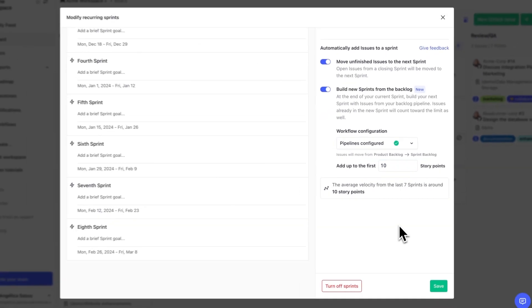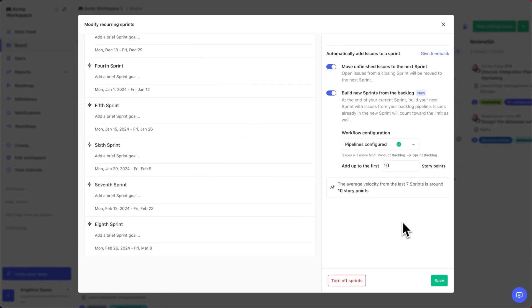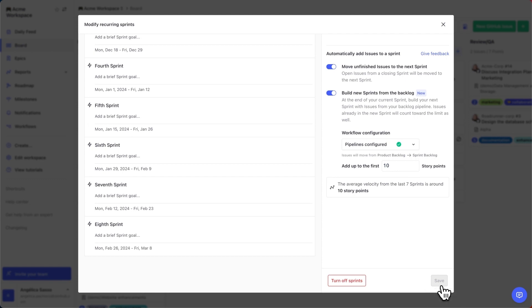If you don't use estimates, don't worry. Zenhub will count each unestimated issue as two points. That's it. Zenhub will now start planning your sprints based on your team's average velocity and your prioritized backlog.